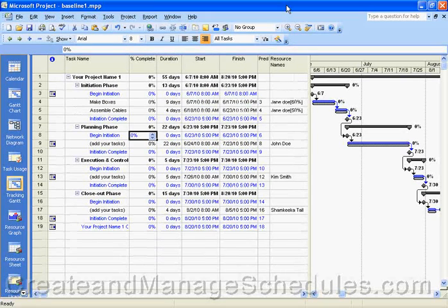So there are many ways to track progress in your schedule, and we're going to have a look at what's available. First, though, we have to create a false situation so that we can observe the effects of the progress. Let's say that this project is planning to start on June 7th. But let's suppose the first week has gone by and some work has been done. So let's change the start to 100% and let's make this task 25%.